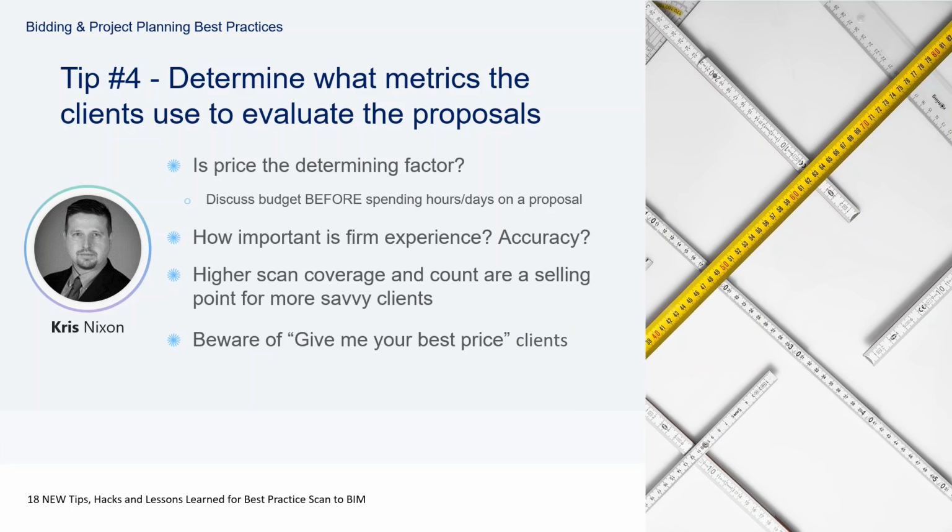And one of the biggest changes for us that we're having the most success with is something that was counterintuitive and actually took a lot of training to get to for us, but to begin discussing the client's budget much earlier in the process. It can be kind of uncomfortable.